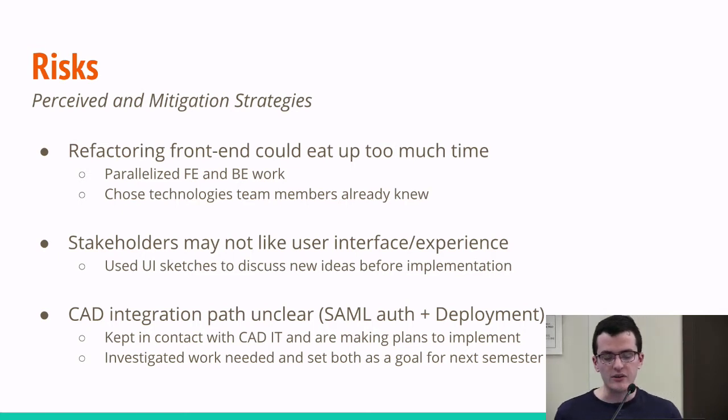And also we were worried that the stakeholder might not like the new user interface that we're refactoring. So we made sure that we created some written designs so that the user would be able to look at them beforehand and also discuss the ideas with them, before the implementation, so that we wouldn't spend time and resources developing something that they might not like.